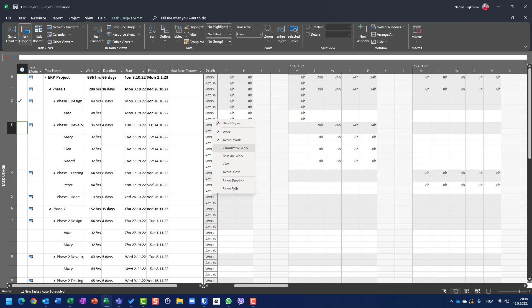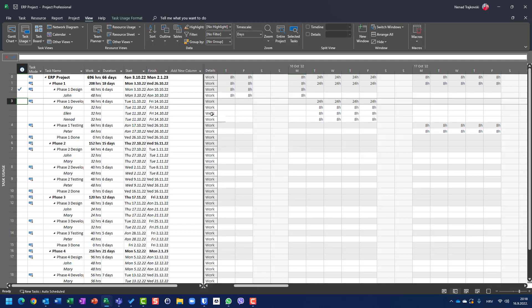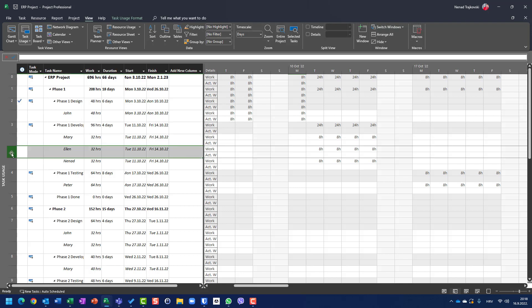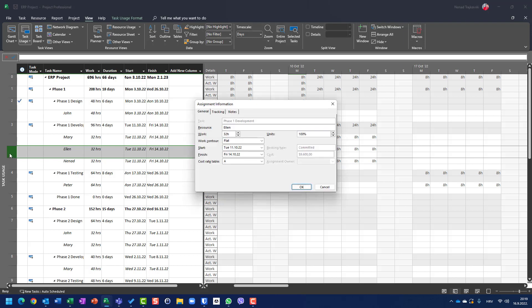In Task Usage, right-click and choose Actual Work. To update a specific resource, I will double-click on Ellen under her task, Phase One Development, and I will get the Assignment Information window. I'll navigate to the Tracking tab — I don't need the General tab.